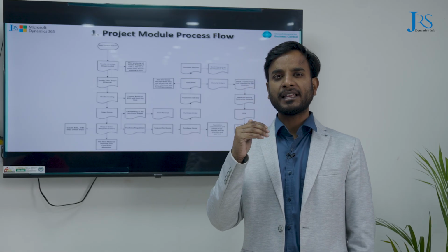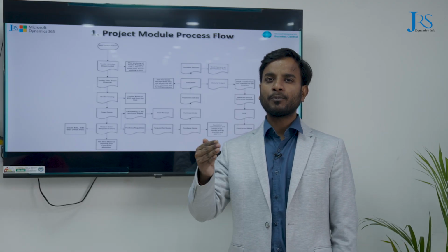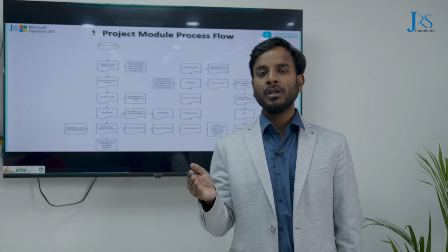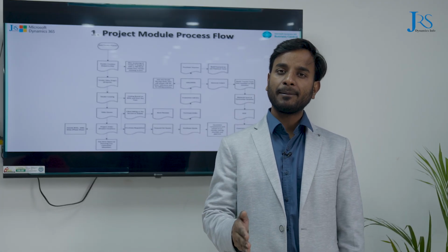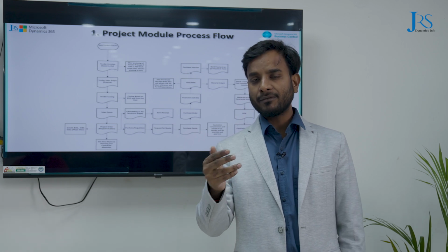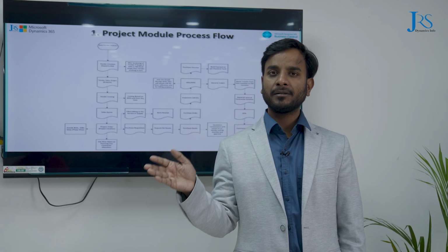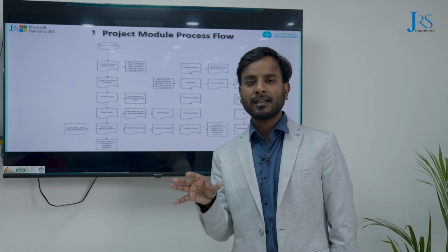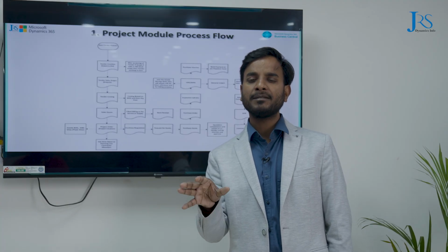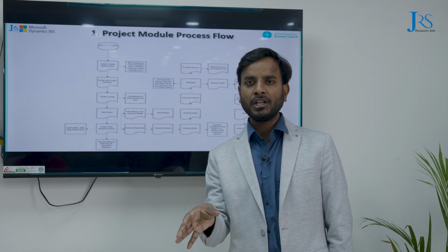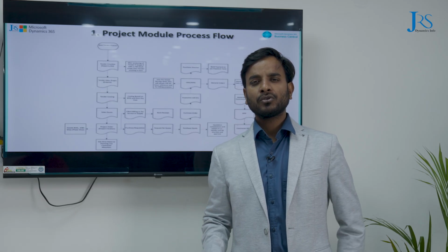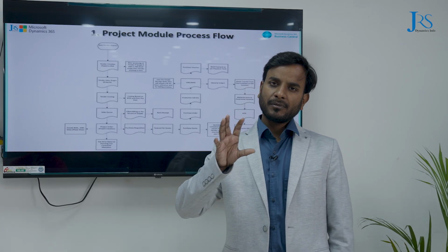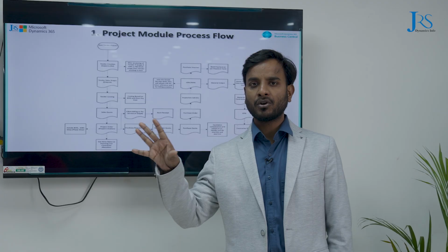We send the material to the contractor, they perform their services, and based on that we have to do the billing. At the time of billing, we have to take the service, what kind of service they have already done, and our service engineer can acknowledge that these are the daily activities. DPR will be performed by the contractor specifically, and these materials will be reduced from the contractor account. So we can achieve contractor-wise stock also. At any time the system will showcase these contractor-specific materials.